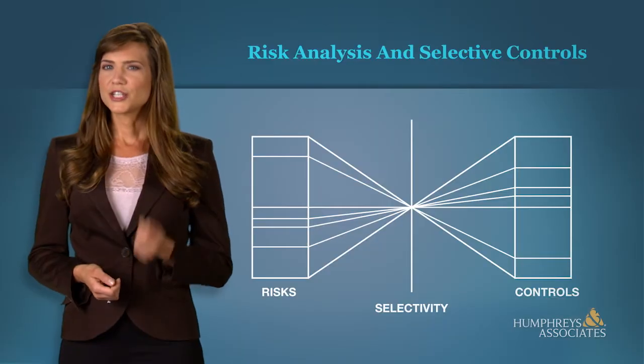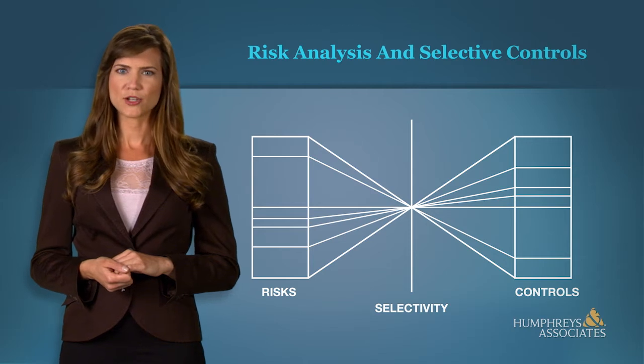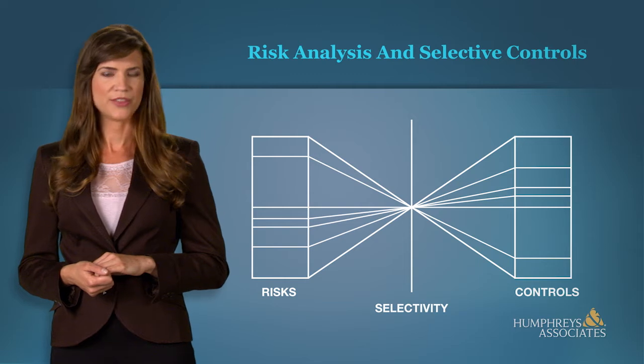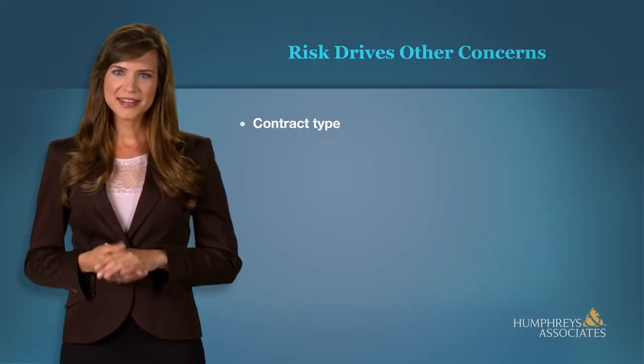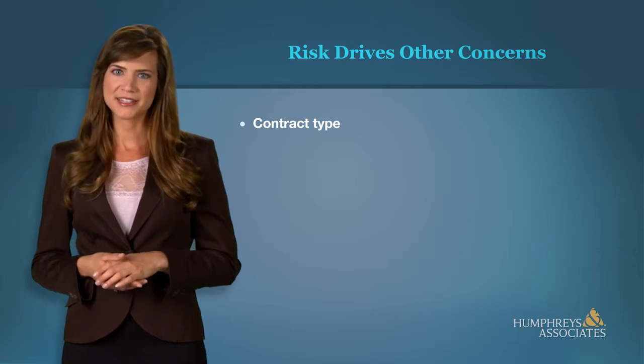Since we have now introduced the subject of risk, let's take a closer look. The determination of whether or how stringently to impose performance measurement on an acquisition is based on an analysis of the risk associated with the acquisition. As risk increases, the need for control increases. The risk analysis impacts several decisions about the acquisition, such as contract type.